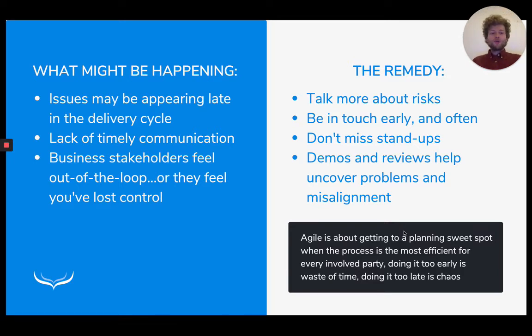And here again, you want to get to that planning sweet spot. You can't tell your business stakeholders and sponsor, that's Agile, we cannot plan anything. We should be able to give them pretty good projections, saying, based on what we know today, based on our previous velocity, and based on our estimates about the size, this is what we should be delivering in the next 2, 4, 6 weeks. But going too far with the planning is a waste of time. And it's really important to get to that sweet spot where you feel confident, and other people in the team feel the same, that you are confident with what you are trying to do. If you are trying to do something unrealistic, you will fail, and that will undermine your position.